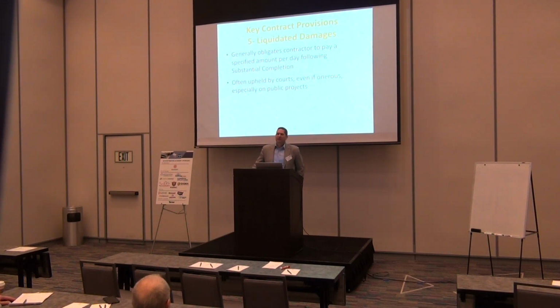But the thing to remember about liquidated damages is that they're generally going to be upheld by a court, and especially on a public project. So if you're dealing with a county or school district or something like that, the courts are generally not going to revisit that. There's many arguments you can make on a private project.